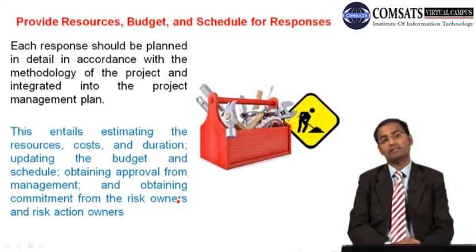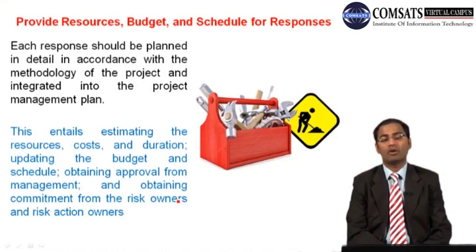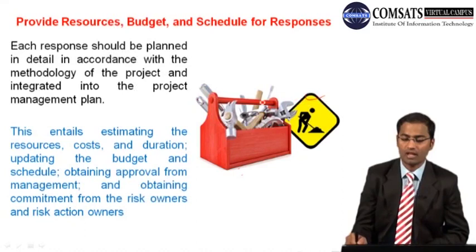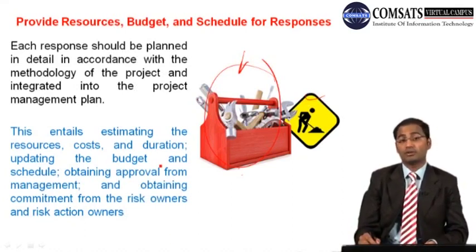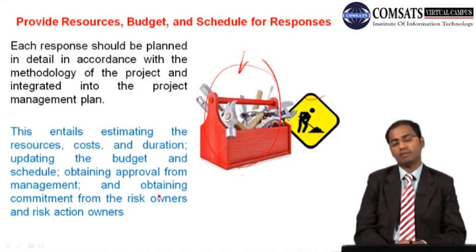You have risks, you have analyzed them, and you have planned a response, and now you have one risk owner, but you haven't given him or her the money or the resources. Do not do that. If you want to be proactive, you should provide the whole toolbox to your team, especially the risk owner. Each response should be planned in detail in accordance with the methodology of the project and integrated into the project management plan. Integration means you should have the budget in the cost part of the project management plan, and you should have included the time of the activities in your schedule, so your total schedule will now have those response activities, and then you should have assigned resources.